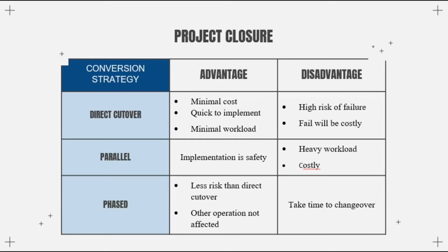For the parallel strategy, the advantage is that implementation is safe. The disadvantages are heavy workload and cost. For the last strategy, which is phased, the advantage is less risk than direct cutover and other operations are not affected. The disadvantage is that it takes time to change over.